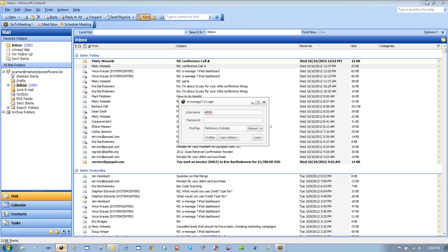Yeah, so what it does is it takes the bid price that they put in, it splits it out by the different phases of the remodel or whatever you're doing, and then it breaks it out for you. So it shows you a breakdown by phase of what the price is per phase, because what we do is we grab the income by phase by splitting that out using the bid price.